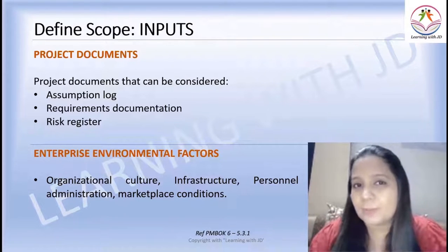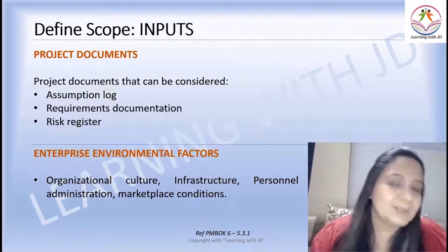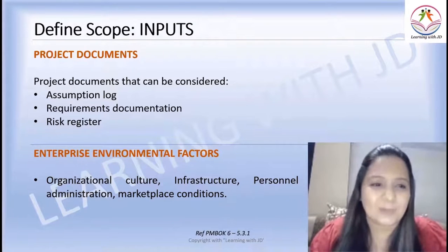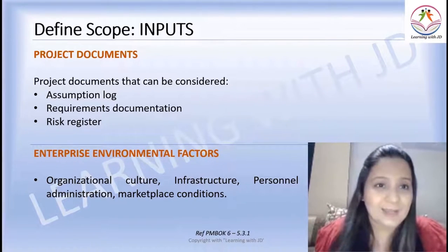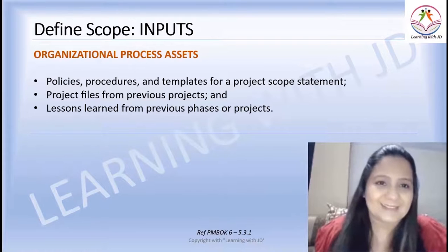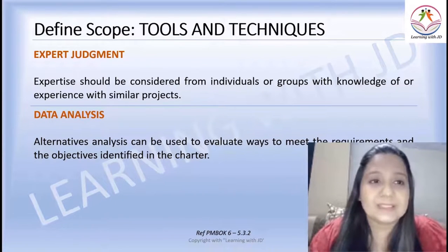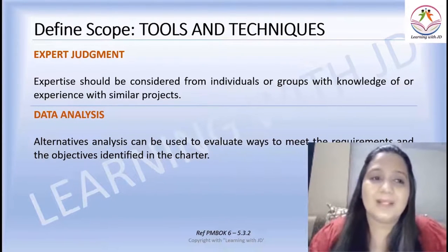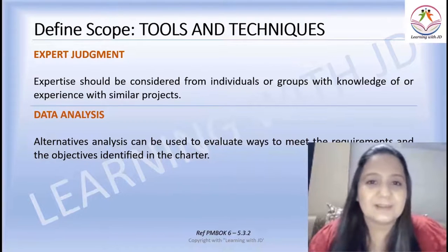You remember, requirements documentation is an output from where? The previous process, that is Collect Requirements. Then you need your EEFs and your OPAs. Let's see what are the tools and techniques. The first one, expert judgment. You will call experts. Experts will help you define your scope.